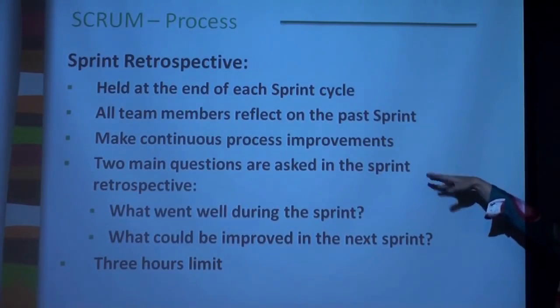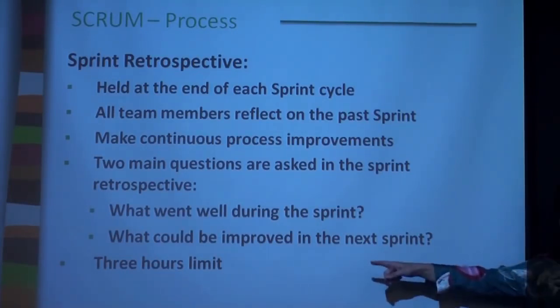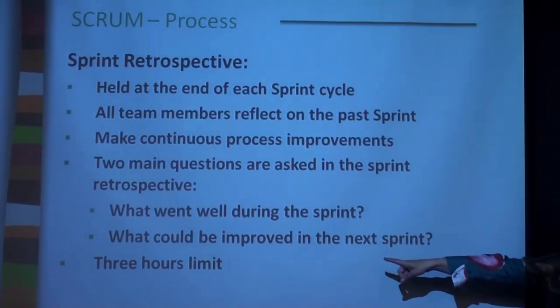And usually, the sprint retrospective is a very open and friendly discussion across all team members, where you try to understand how you can improve things that went wrong in the previous sprint, so the next sprint is more successful, right? And again, the team should limit itself to a 3 hour limit. Otherwise, the complaining part may take too long. And actually, the Scrum Master is the guy who manages the time, because this time is your sprint time, right? These 3 hours are part of your sprint.